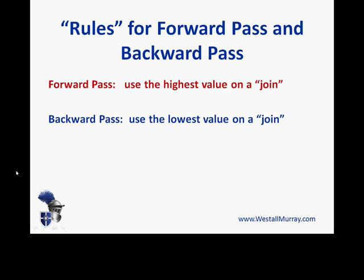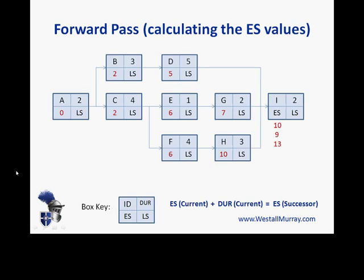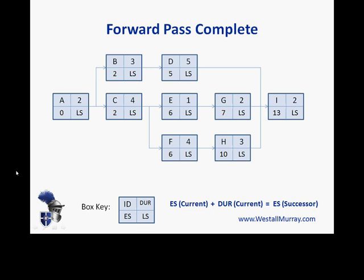Going back to our rule for the forward pass, we use the highest value on a join. For I, if we go the top route A, B, D — from D we get a value of 10. Coming from G, 7 plus 2 equals 9. Coming from H, 10 plus 3 equals 13. So the highest value is 13, and that's what we put into I. That completes the forward pass.